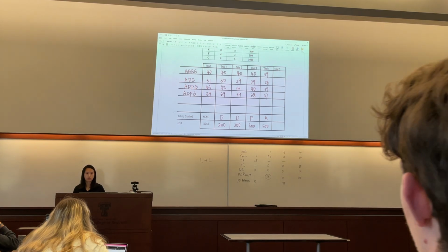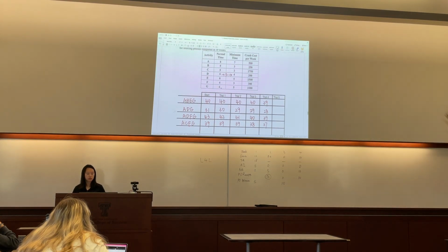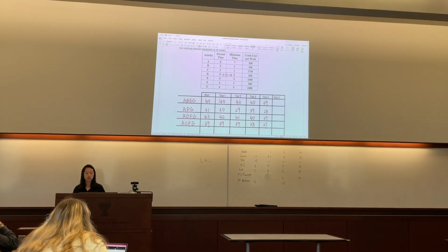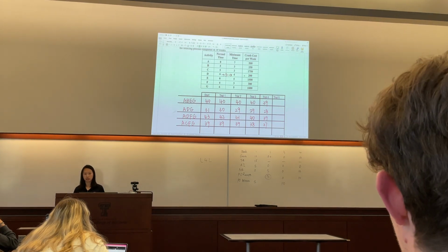Why would you crash D twice? Because you see, D, the minimum is 4, right? Oh, you can do this twice. Yeah. After you crash it to 5 weeks, you compare A, D, F, and G again and see, okay, D is still the cheapest one to do, so you crash it again. Gotcha.